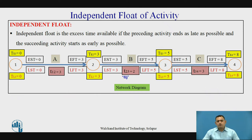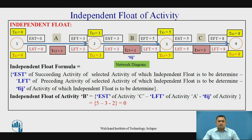Independent float is the excess time available if the preceding activity ends as late as possible and the succeeding activity starts as early as possible. The formula is: EST of the succeeding activity of the selected activity, minus LFT of the preceding activity of the selected activity, minus the activity duration.